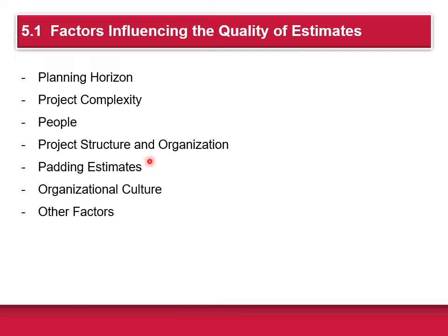Another thing you can run into is what's called padding estimates. Padding estimates is the practice of adding a fudge factor, which sounds like a good idea, but actually it makes it much harder to get good, reliable results. So typically padding estimates are discouraged for that reason.